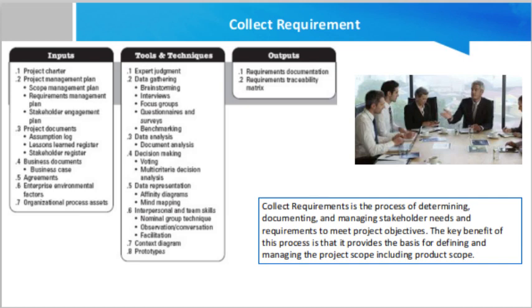Every requirement should be detailed enough to justify the criteria to meet the requirement, meaning that a requirement must always be measurable. For instance, it is not enough to state a requirement as "the web page loading speed must be reasonably good."